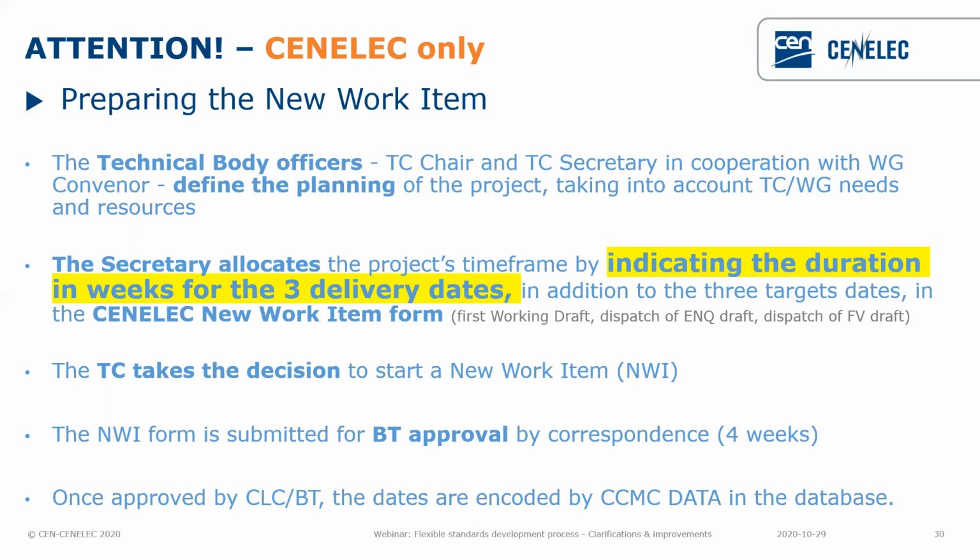So for the CENELEC secretaries, when you have a new work item that was agreed, you have to send it over to your PM and/or to data service, and then it's up to the CCMC PM to draft the BT document, to send it to BT for a decision by correspondence, which will take 4 weeks.